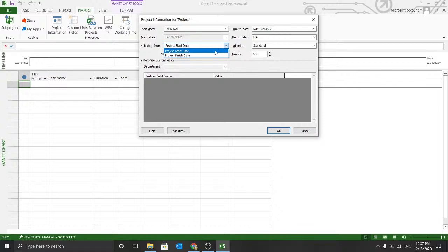Usually, if you have a certain deadline to meet, then you create a project plan based on the project finish date. So you backtrack your tasks based on that. MS Project will create the durations and align the dates as per your finish date, changing your initial dates and keeping the finish date constant.